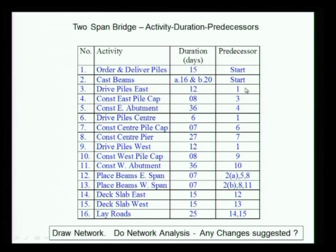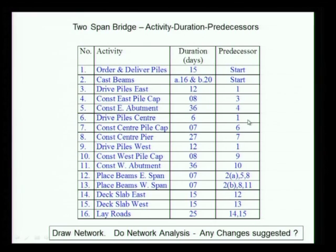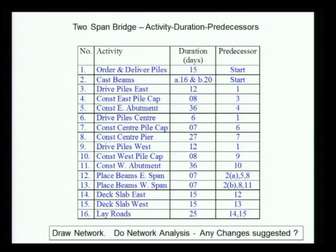Driving piles is after delivery. I can construct the pile cap only after driving. East abutment comes after pile cap. Pile center after delivery, pile cap after that, the center pier after the pile cap is done. Piles west — drive and construct west pile cap. Now east span is based on the west span, and it depends on center and east.